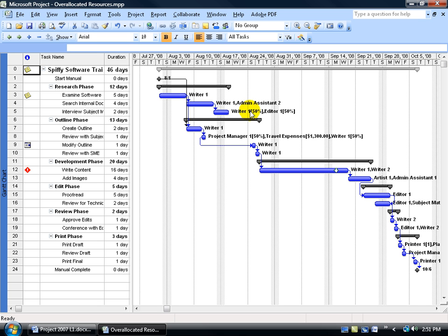As you recall in the creating resource calendar training video, every time you create a resource, a corresponding calendar is going to be created. For my administrative assistant, I modified that resource's calendar, so it's no longer tied to the project calendar's defaults. I said that the administrative assistant is not a typical 8-hour working day person — they're part time, 4 hours a day. So when I assign the administrative assistant to any task, their 100% is 4 hours, not 8 like everybody else.